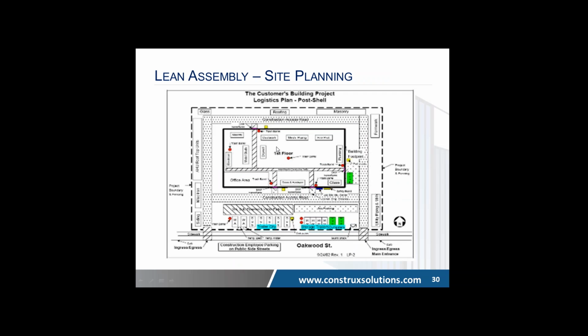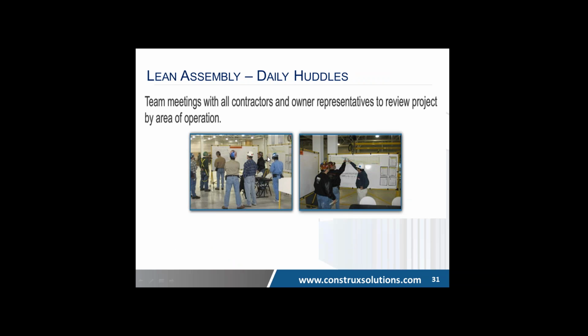Site planning, we talked about this briefly. Here's just an example that I pulled off the internet of coming up with a place where materials need to reside that is kind of out of the way from everybody else, and thinking about that can cut costs. These team meetings, these daily huddles, it just keeps everybody on the same page, and you have these pull planning sticky tabs on the wall which tell you what you're going to get done in the next 3 weeks.